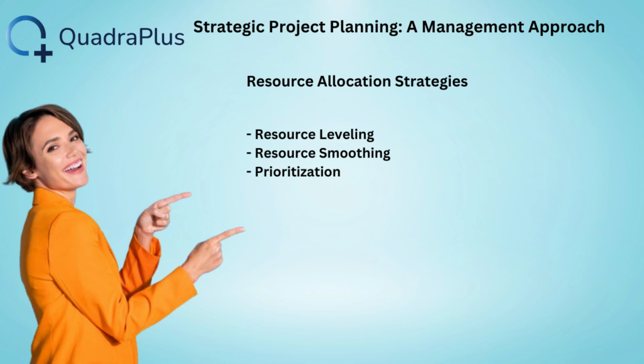2. Adjust based on changing project needs. As projects evolve, resource needs shift. Unexpected challenges, client feedback, or external factors may require realigning resources. Example: software development adaptation. During a software project, new security vulnerabilities emerge that require urgent attention. Developers are temporarily reassigned to resolve these issues before continuing with their original tasks.